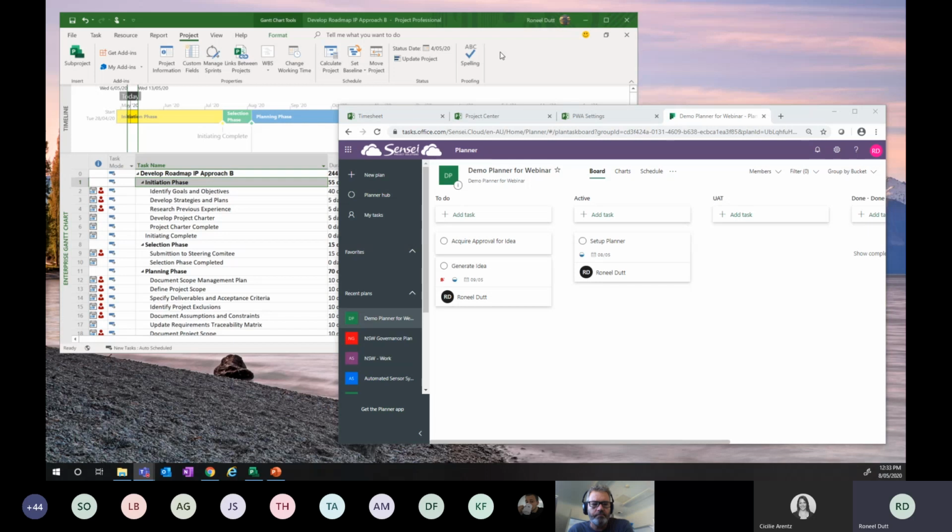However, setting baselines, some of the simpler calculations, consistency in what you call a schedule KPI. So as an organization, organization X may say, if my task finish date slips by 10%, then it is now flagged as amber. If it's by 20 days, it's going to be red.